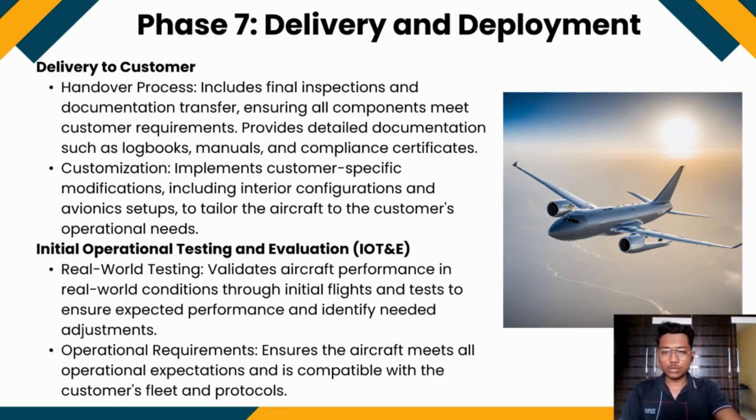Then there is delivery to customer. First of all, it is a handover process, which includes final inspections and documentation transfer, ensuring all components meet customer requirements, and provides detailed documentation such as logbooks, manuals, and compliance certificates. Customization implements customer-specific modifications, including interior configurations and avionic setups to tailor the aircraft to the customer's operation and needs.